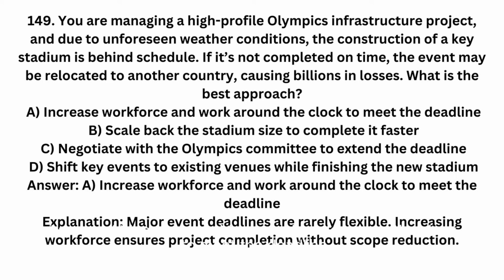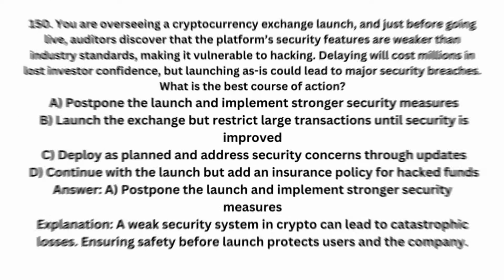Answer: A. Increase workforce and work around the clock to meet the deadline. Explanation: Major event deadlines are rarely flexible. Increasing workforce ensures project completion without scope reduction.